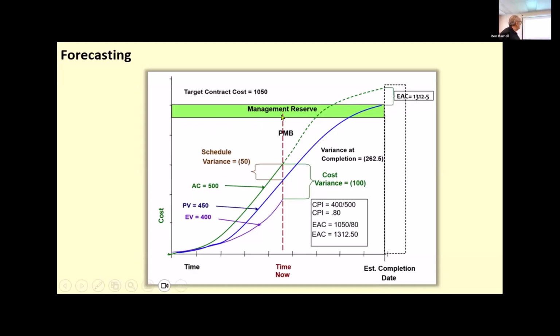Well, if the project is 50% done, like say this project is, then this part of the management reserve, in my instance, they wanted that money back. It wasn't really actually given to us, but it was apportioned on their books, so it wasn't available to anybody else. And if 50% goes by and we hadn't used it, they wanted the money back. If I wanted to keep the money in the budget, I needed to justify that.